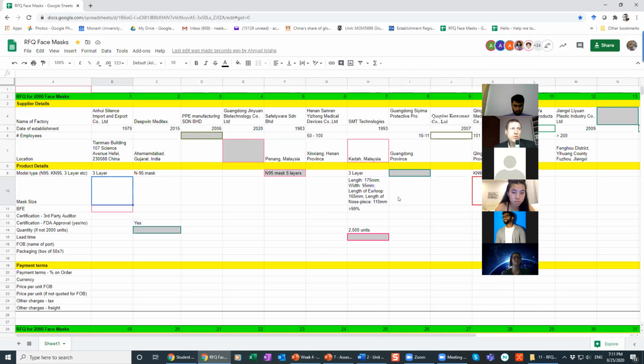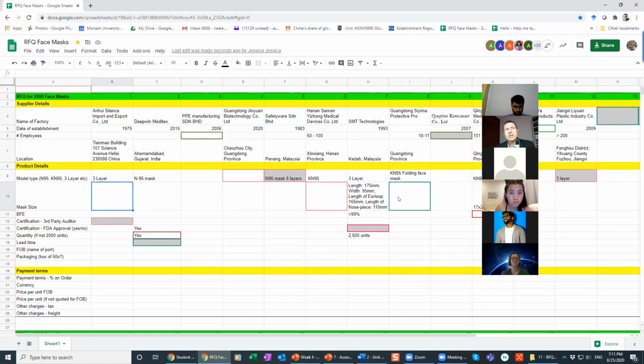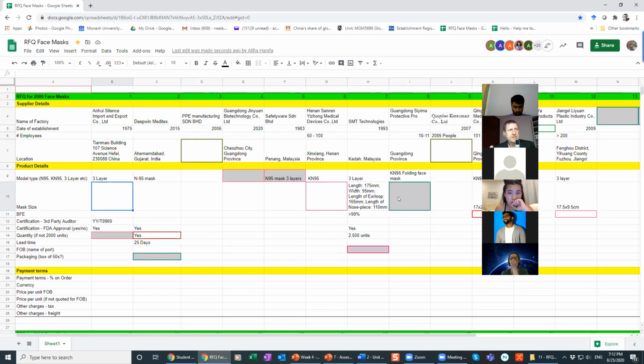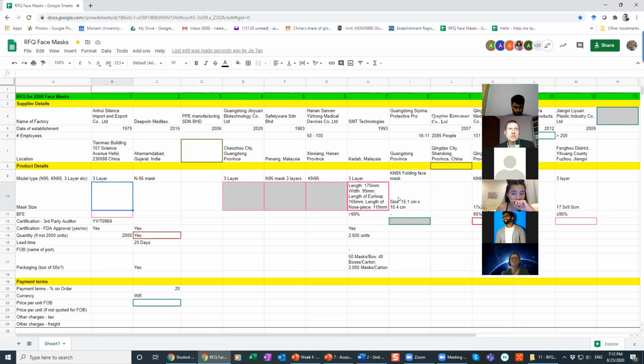It's not unusual when you are starting to source from suppliers, and if it's a serious product, even more serious than masks, then you would get requests for quotation from a minimum of 5, 6, 7, 8 suppliers. You would not just get one from a single supplier, especially if you start to talk about spending 10,000, 20,000, 30,000 US dollars. Once you get into those figures, you really want to make sure that you have the supplier that fits your needs. And your needs, for the most part, shouldn't be dictated by price. There are many other factors you need to consider.